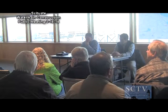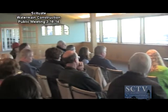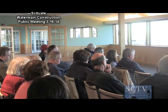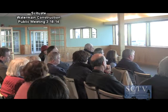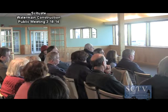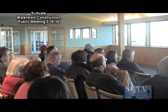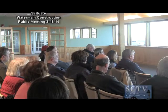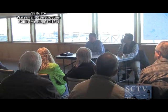I had a call this morning from the high school, from the life skills program. Every year we've had high school students working out at the lighthouse, cleaning the area, a little bit of painting, reading, that kind of thing. They're talking about canceling the program this year because they are concerned that the work will still be going on, and they start up right after the July 4th weekend. What should I tell them? Our plan was to have it completed by July 1st. That's what we're shooting for. There may be delays, but if there is a delay, I'm expecting mid-July that it's done.